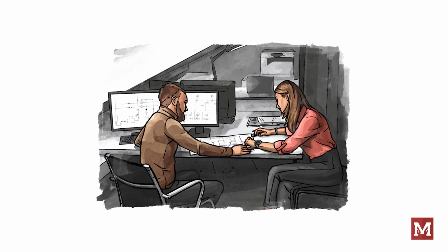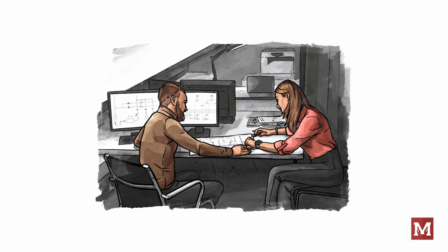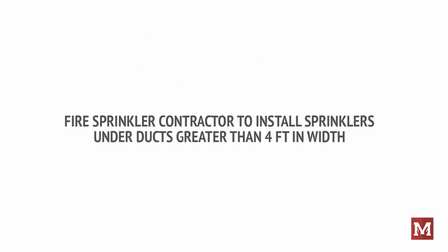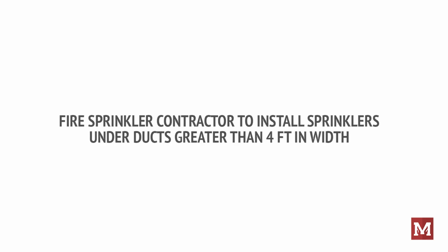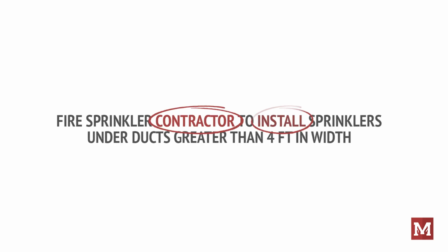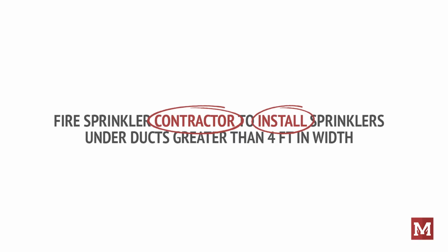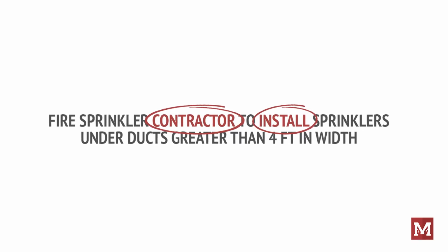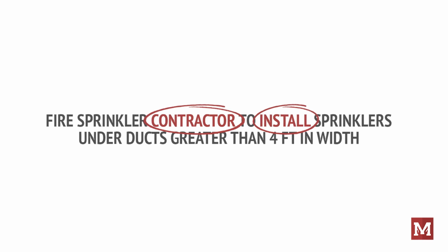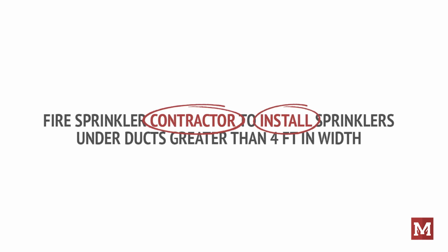Their job is not to just look good, although that certainly helps make the instructions clear, but what's on them has to clearly communicate the story that we're trying to tell. When we're putting together drawings and writing those notes to convey our scope, remember, scope requires two things: a noun, what the item is, and a verb, what is being done to it. Clearly and succinctly, we should be describing what needs to be done, carefully choosing our words to say precisely what we mean, no more, no less, and without leaving it up for interpretation.